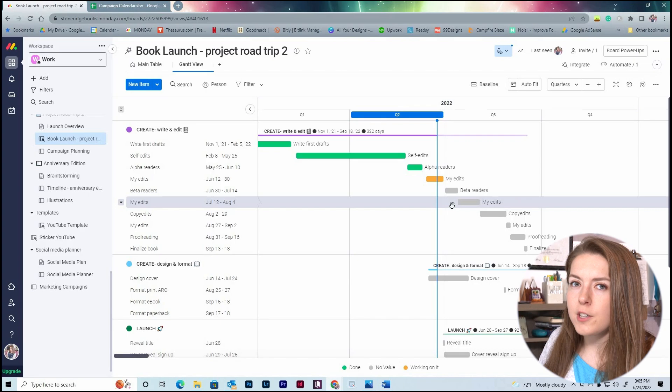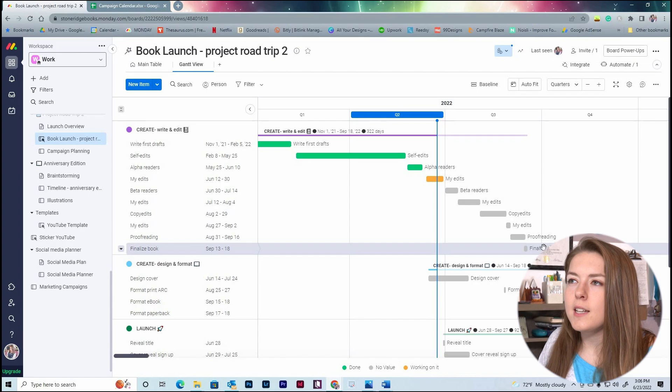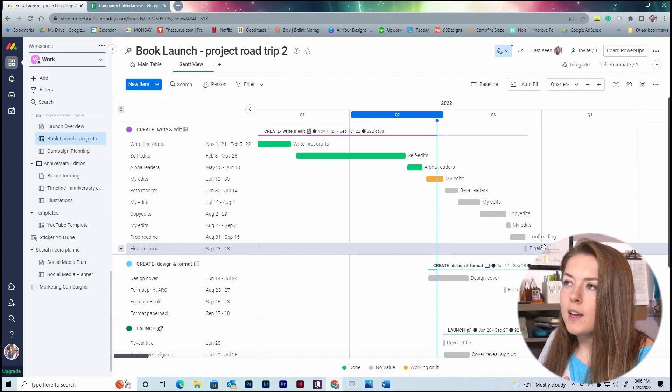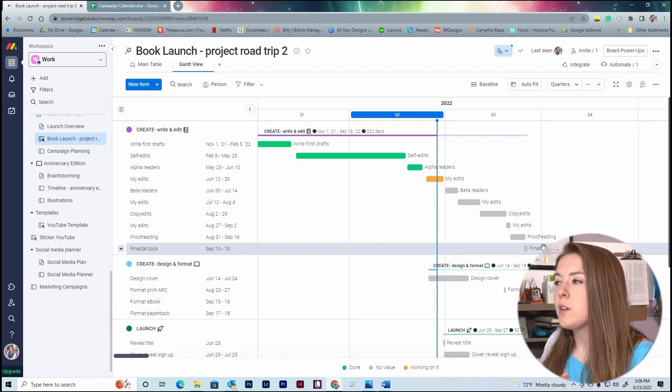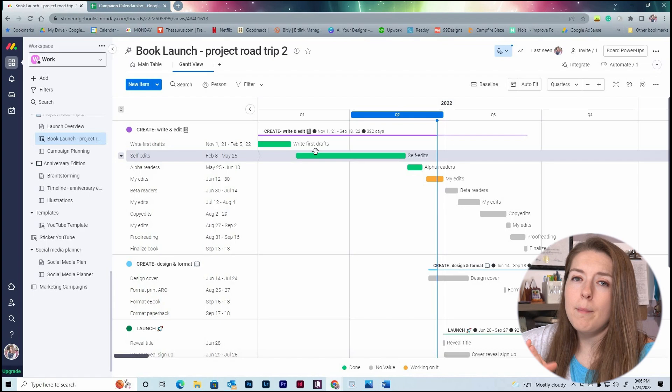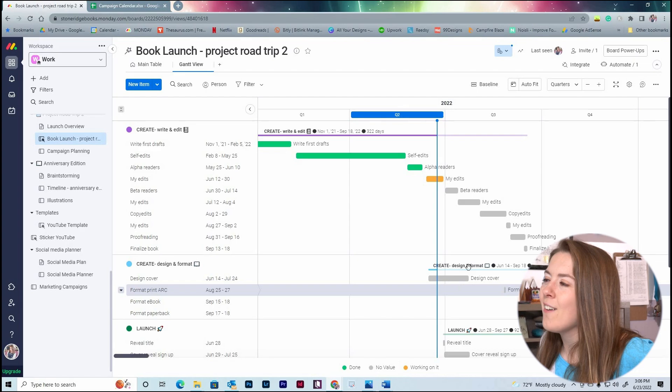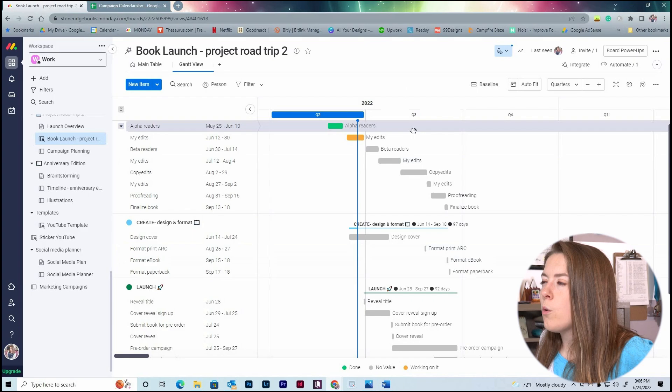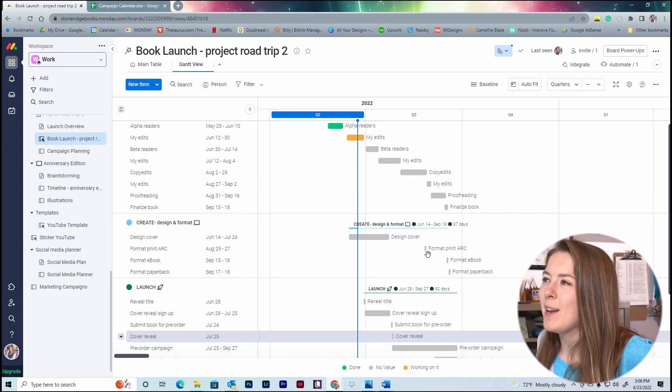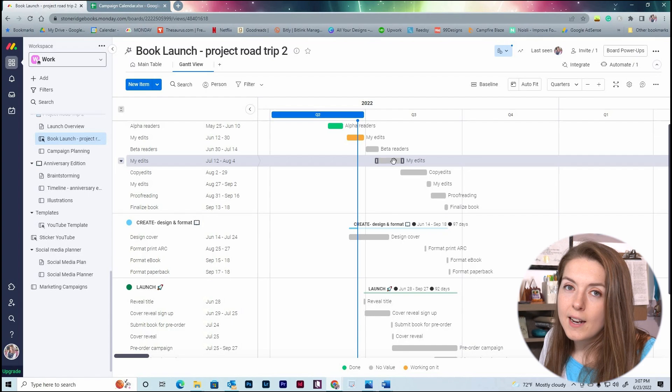It's really cool because you can easily move things around and make it visual. And there's even if you upgrade your account, you can actually make it so if I move this date out, it will automatically move the date out for everything else after it. But that's a feature that you have to pay extra for. I personally didn't pay extra for it. It's something that you should know you're able to do in Monday. So literally if one task is taking you longer and you have to bump the date out, it will automatically bump the date out for everything, which can be super helpful. This is a good way to make sure that you have nothing overlapping, because that's an issue that I always have.